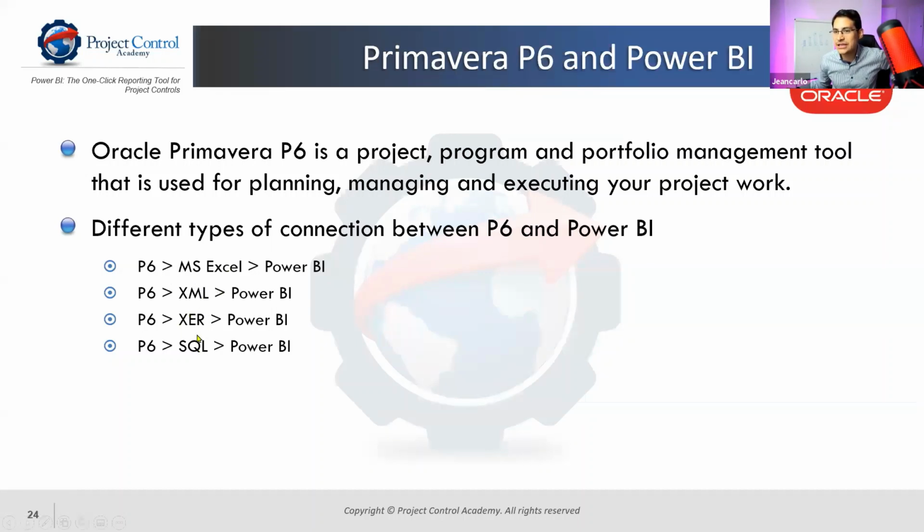You can export XER, that is the native format from P6, or you can just connect Power BI directly to the SQL database of P6. Either way, what you want is to automate that process. You don't want to start exporting, copying and pasting Excel data from P6 to Excel, trying to manipulate and consolidate that data, and formulating that in Excel to show a report. That's really time consuming, and we don't want to spend that time that way, right?